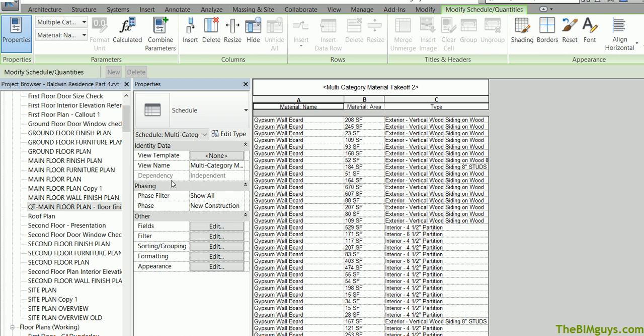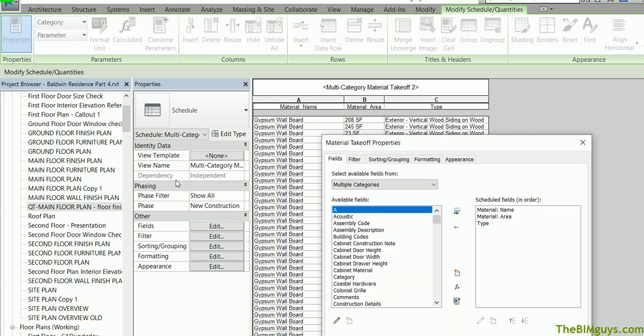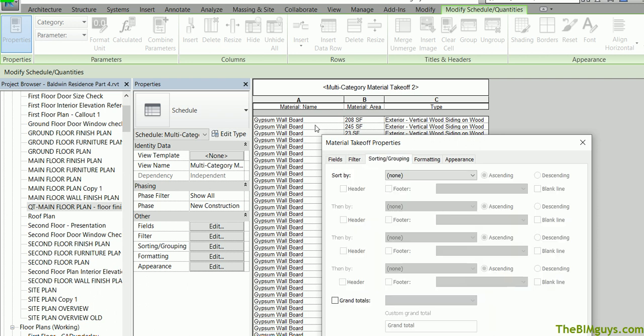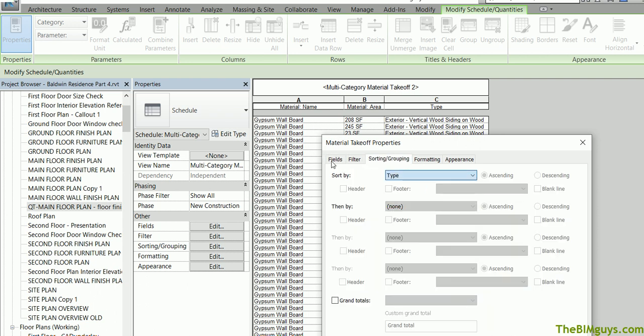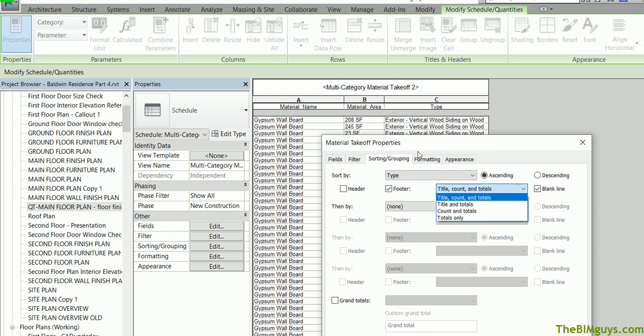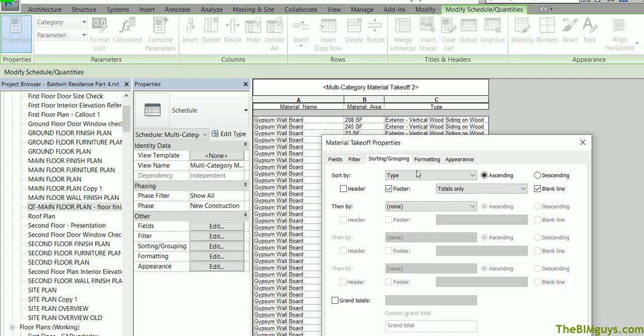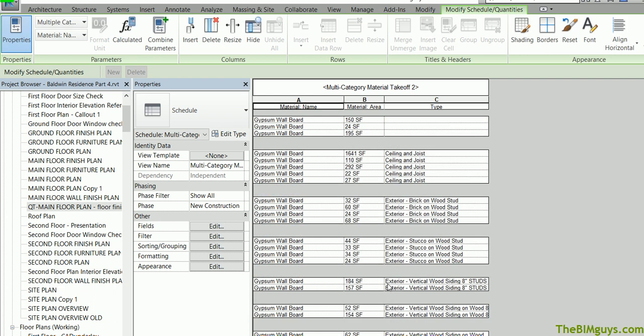I'm going to go up here to, again, I'll start in fields or we can go to filter, grouping, etc. Start with fields just so you see where I am. I'm going to go over to sorting and this time I'm going to say sort by what? Sort by type. Now it's going to put them in order of what they're used on. I'll put a blank line between it and I'm going to put a footer that's just going to give us a total so we'll know what the total use of it or how much square feet of gyp is being used for each one.